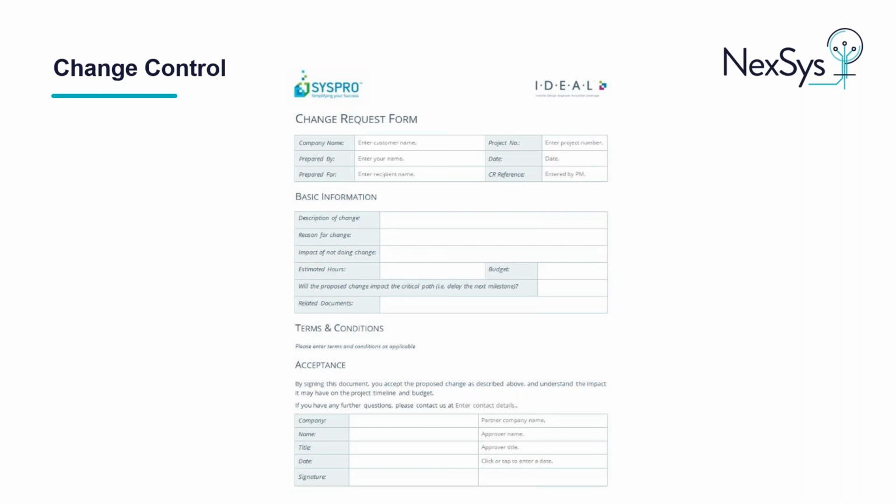If a change was to arise on a project, we require the project manager to be notified as soon as possible. For example, if you required on-site training as part of an upgrade project for convenience reasons, rather than the standard classroom training delivered at our Salford office. This would be classed as a change as it would impact the project budget and a change in the agreed scope. We would then document the change in a change request form as shown on screen, which includes the description of the change, reason for the change, impact of doing the change, the estimated hours, and budget required. This would then be sent over to the project sponsor for approval and recorded in the change control log. Only once the change has been approved and budget provided, if required, can the change be actioned and scheduled into the project plan.